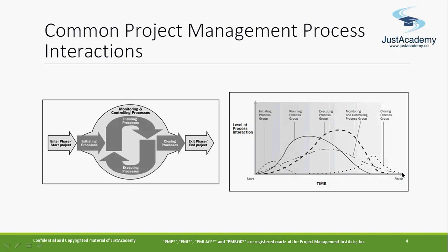So finally you close and say, hey, the project is over, and you have to release your resources. You can release the resources early based on the work. Like you start releasing resources during monitoring and controlling, as the work slowly declines. If 10 resources are there, I will release 1, then 4 resources will be working for another week. Because you don't want a cost overrun, all those things. So these activities need to be planned and done.